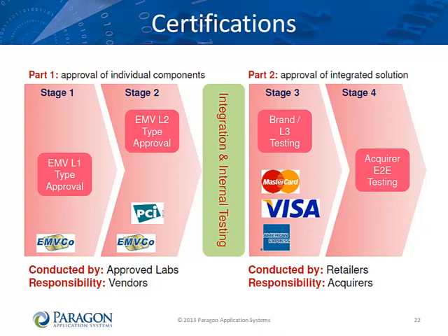There are often several layers of formal certifications. First will be the testing of the terminal and the EMV kernel. Then you may have a functional certification with a network, followed by end-to-end testing. Some networks require that the final certification of a terminal must be performed when the terminal is connected to the production environment. Make sure you understand the specific requirements of each of the networks you connect to and must certify with.